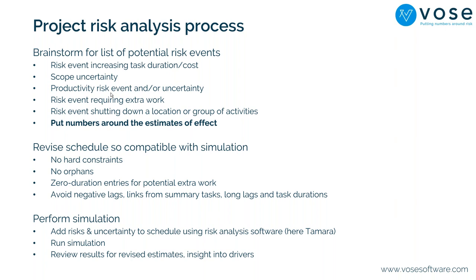You also need to assign values for the range of impacts on your project. Ideally you consider the task most affected and estimate how much extra time it would take — typically using a three-point estimate of minimum, most likely, and maximum. The maximum is difficult to estimate as it can be almost infinite. We prefer to ask for the P90 — there's a 90% chance the delay would be less than a certain amount. This is an easier question to answer than asking for a pure maximum.